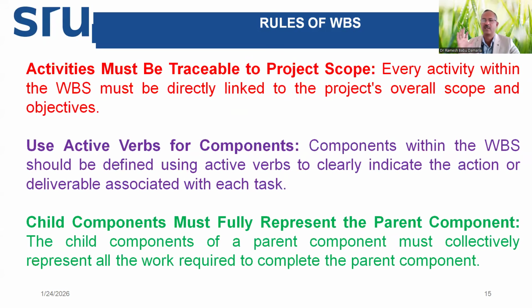All electrical systems, including the battery, ready. All steering system ready, including the steering wheel and hydraulic mechanism, up to where it is connected to the wheels. All braking system, brake pedal, brake levers, then hydraulic or electrical mechanism, till the tire, how it is connected. So like this, each child component together under one deliverable is connected, and it will clearly indicate that it is completely provided for.